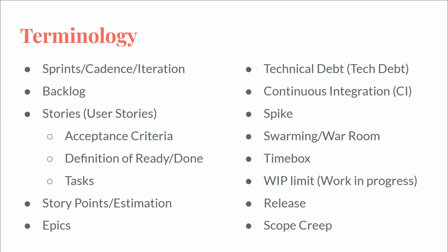Or we can say, okay, well, that was cool. We understand what that does now, and we've learned from this as a team, but we're not going to go that route, so we can just dump that work. So that's the idea of a time box, is to make sure that you don't spend a lot of time on something that you're just going to end up dumping anyways. Cool. Swarming and war room.